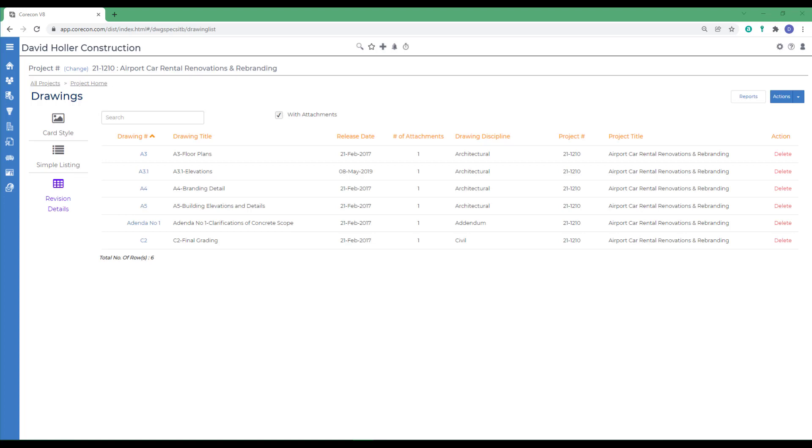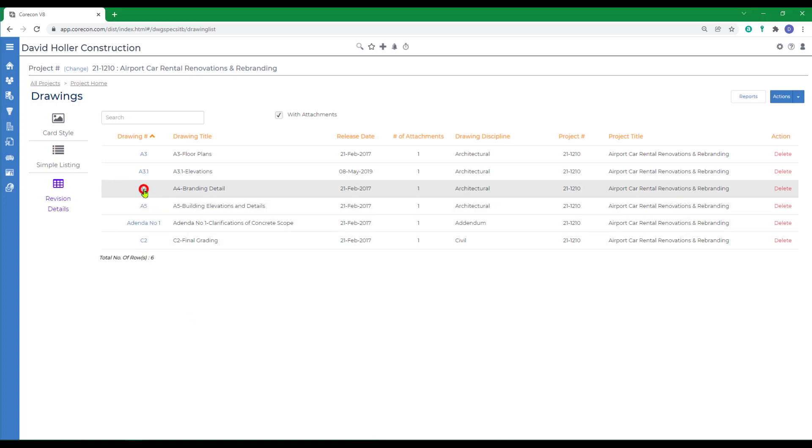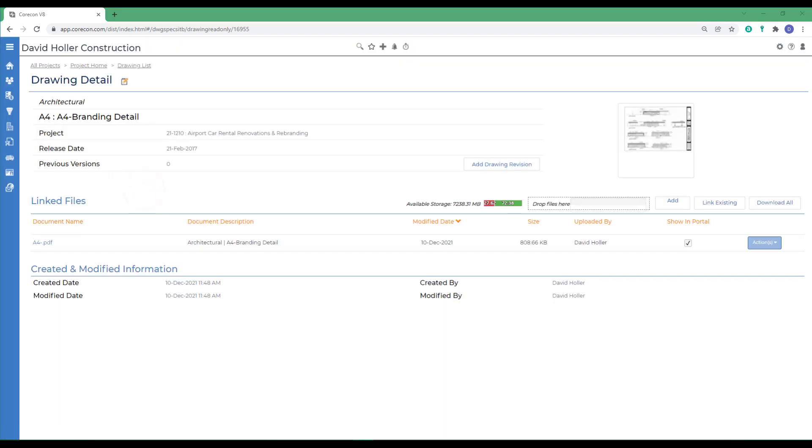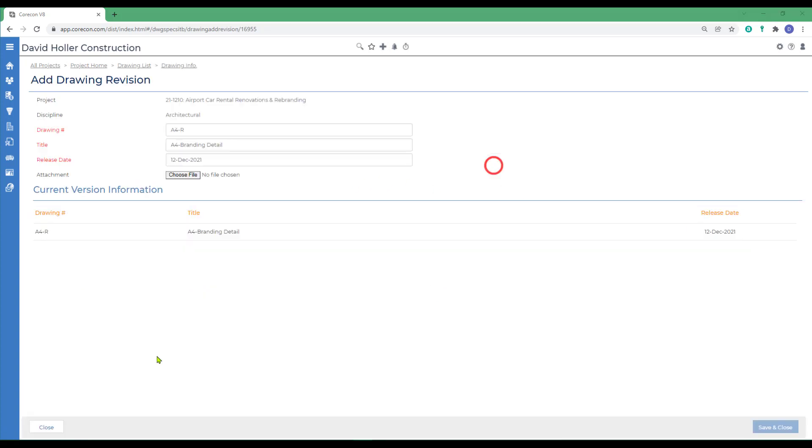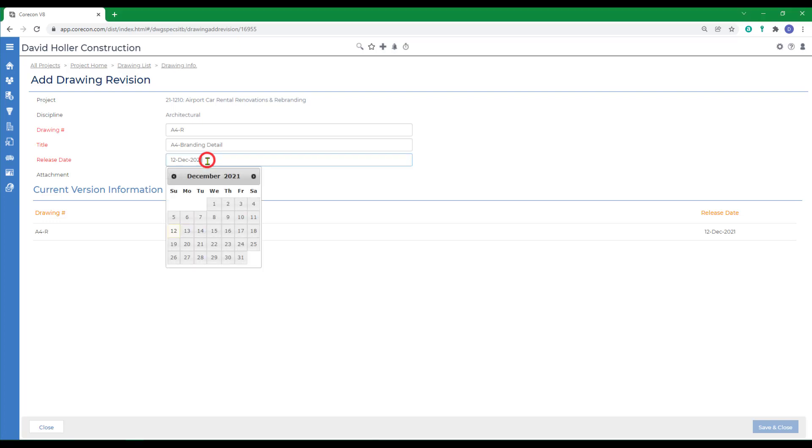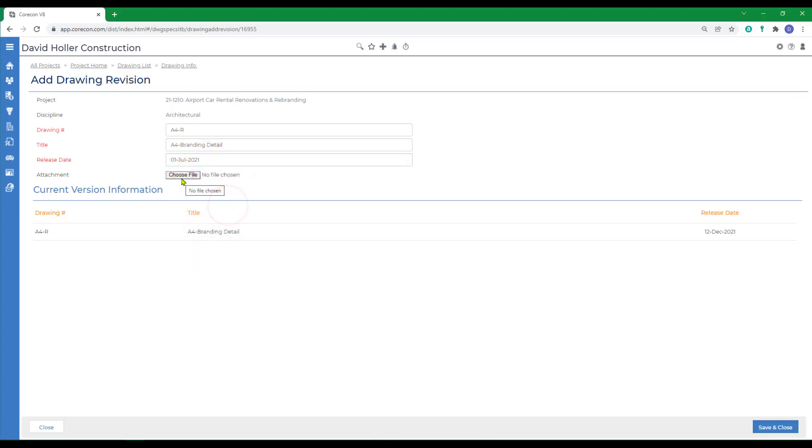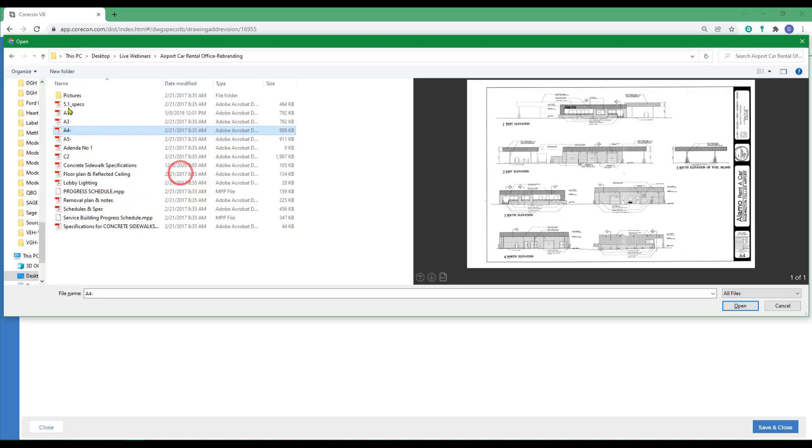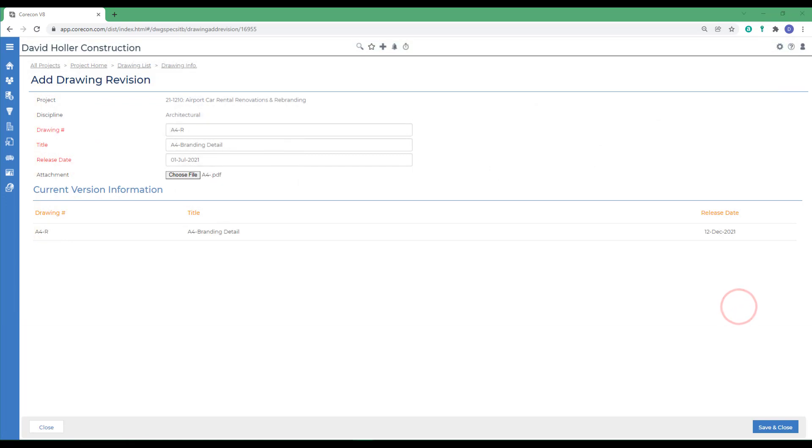To add a new revision to an existing drawing, I want to select a drawing that I want to add a new revision to. I'm going to select the drawing number. I'm going to click the Add Drawing Revision option. CoreCon has already suggested a new drawing number and new title and is using the current date as the release date. I'm going to just correct that and then choose file. I'm going to select the newest revision and click open. Then I'm going to click Save and Close.